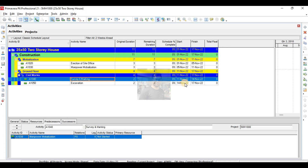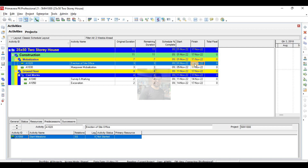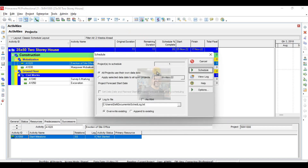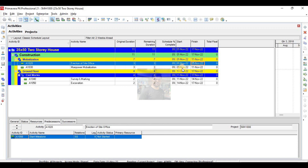Now it is showing me only those activities which started before and are not yet finished. The date here is the second of October — first of November, sorry. Those activities which have started but not finished, and which will start within two weeks from today, are included in the two-week look-ahead schedule.